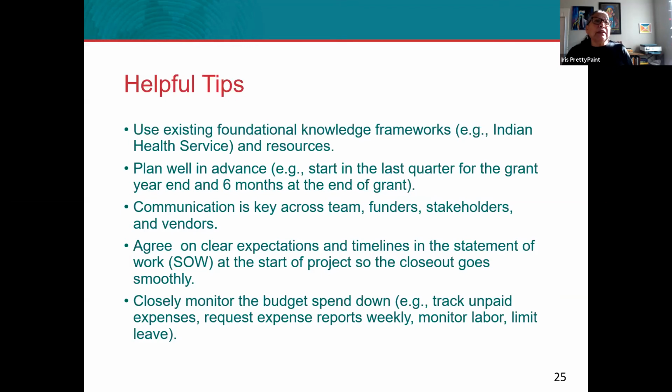When you start your planning, and you start to think about it in 4 quarters, if you have a 1-year grant, and when you schedule your deliverables out, you can put deliverables in those quarters that need to be done in that sequence, and planning that process will help you to see which part of your grant is going to have the most work involved. We talk about things at 6 months to be able to have those milestones. And then again, at the end of the grant. So there are things at the end of your grant that you want to make sure that you're able to do.